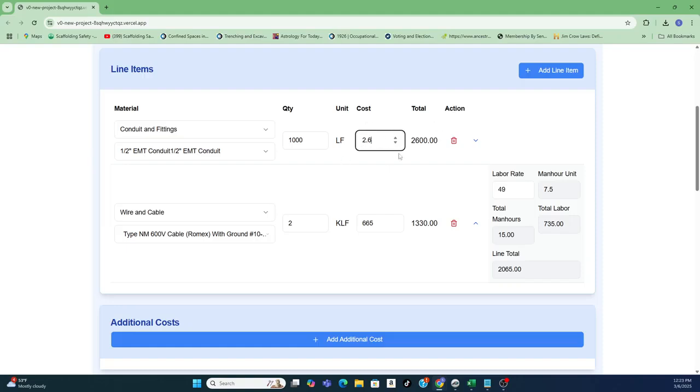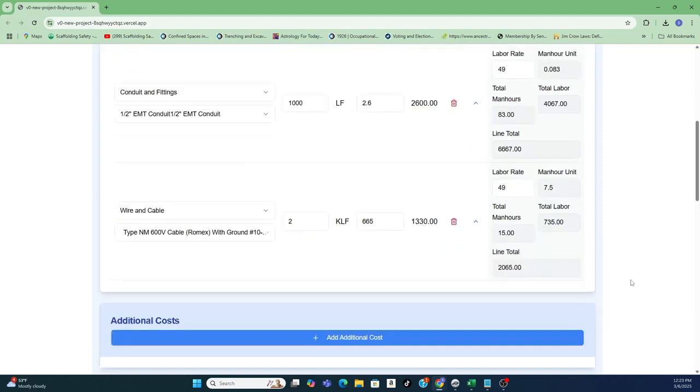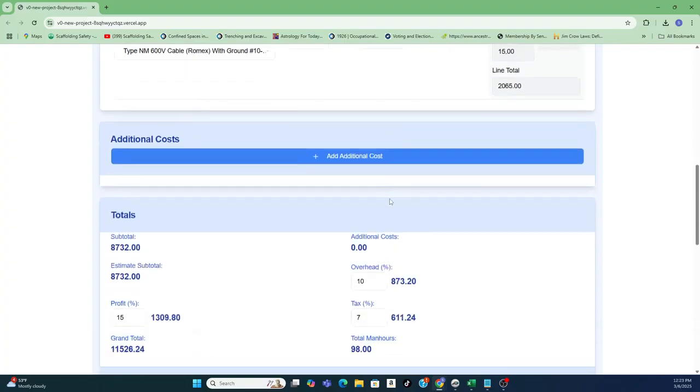Okay, so what you don't have to input is the man hour unit. You have to input what you're going to pick, the quantity and the cost. This part isn't chosen for you because those costs are always going to change. And so again, what do we have here? All right, we go to the drop down, and now we have everything here, all broken down in great detail. And so now if you want to start to create your construction schedule, your WBS, you've got everything you need right in front of you. Okay, so it's beautiful.